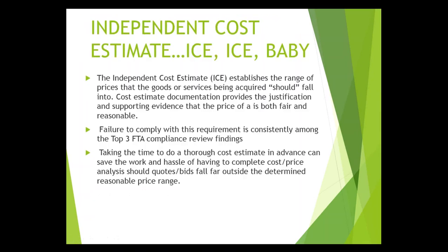So one of the biggest and most important pieces of procurement is the independent cost estimate. This requirement is consistently among the top three FTA compliance review findings, and that is typically because either the ICE does not exist, it never happened, or it was not documented. Part of the fun with FTA is that even though you know that you've done it, if it doesn't exist on paper, in the FTA's eyes, it does not exist. So we need to ensure that we're documenting each step of the process along the way.